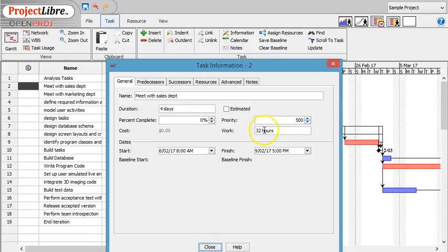You can set priorities on different tasks, and you can see that for this particular one, 4 days, 32 hours. If you're only going to work on that for half of each day, but it's still going to take 4 days, but we could have less hours, then you could put that on there. And the start and the finish, if you remember, are automatically set. Okay, so this was just the information that we already had, plus a couple of other things as well.